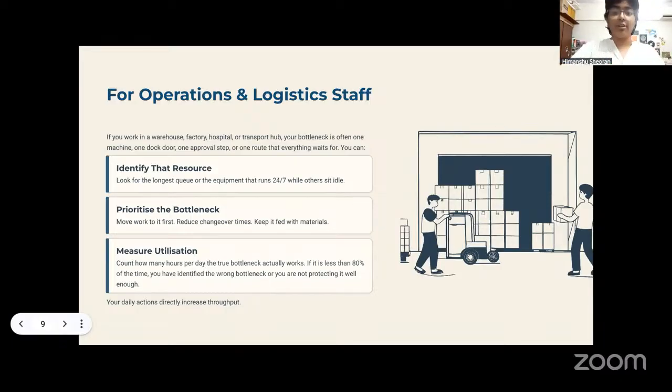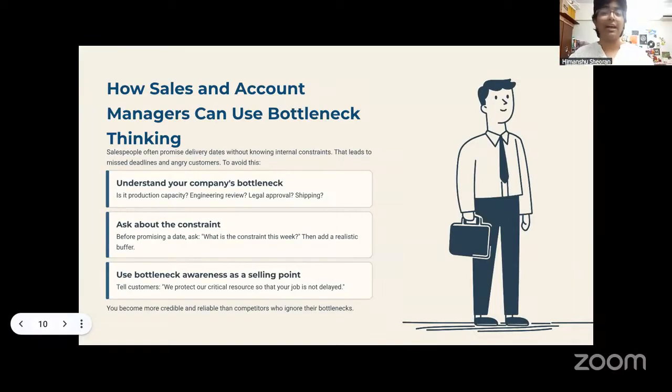Another role you can look at is operational and logistical state. Here, in the logistical state, you need server access, but it is taking way too long. In server access, they are taking 5 requests per hour. So again, exploit, protect. What you can do, you can have pre-approved access templates. Such templates can be used, and then you again do the measurement. You check, I was taking 1 hour for 5 requests. How much am I taking now? Is it 10 minutes? No. Yes. If yes, good. If no, then you have to report it to your supervisor. It's the same everywhere.